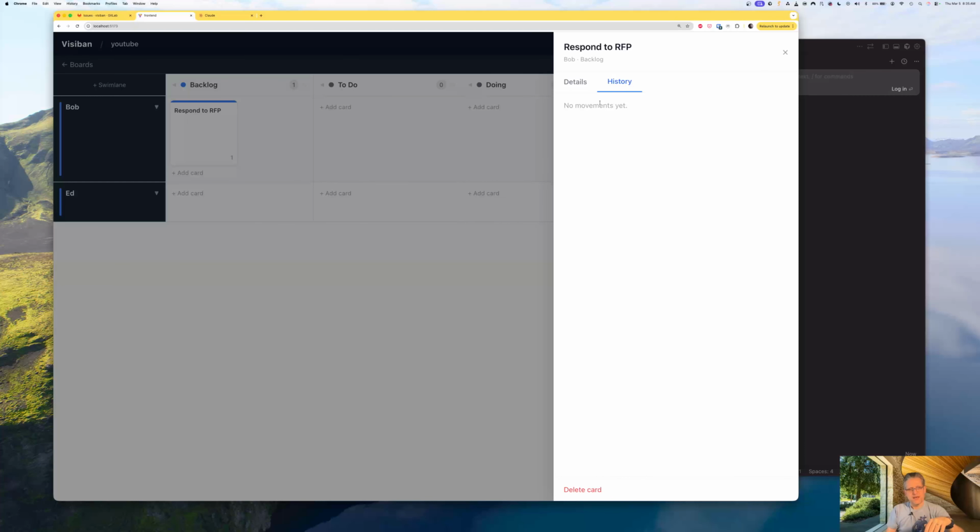So there'll be a whole history backlog on things, because that's very important to understand. It's like, you haven't done anything on this for the past 2 weeks. What's up? Go do something, right? So you can even put rules in about if the card is inactive for more than 2 weeks and it's not a backlog, flag it, make it a higher priority item. So there's all kinds of rules that get put into place here that are customized to what my needs are, as opposed to whatever Smartsheet or PlanView. Again, I could probably be bastardizing PlanView's name, and if I am, I apologize. It would allow me to customize it exactly the way I want, and not just what the SaaS offers, which is really valuable to me at least.